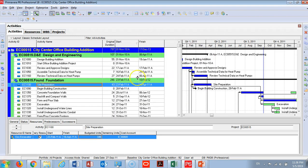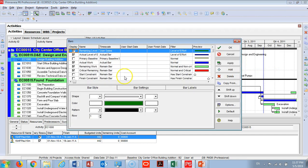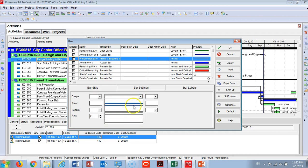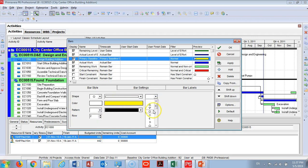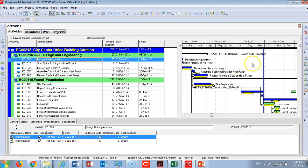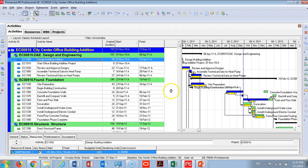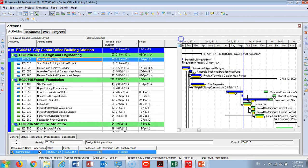Right now you cannot see anything on your screen until you go to the Gantt chart and right-click and choose Bar. I will go and choose Primary Baseline. I can choose the thickness, I can choose the style like that. I will put it in row number three so that you can have some distance between them. I will apply and now you can see that you have your baseline shown like that.